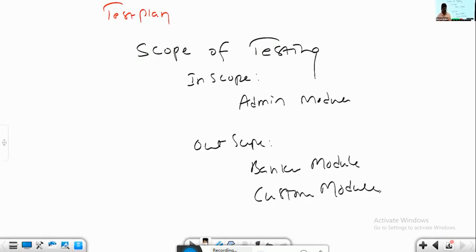So all these 10 people study requirements about only module 1. They write scenarios and test cases only for module 1 in the first phase of the schedule. If this is not mentioned in the plan document, the team members will be confused about whether they have to focus on everything or only a few requirements. A big work definitely needs to be split into multiple phases.